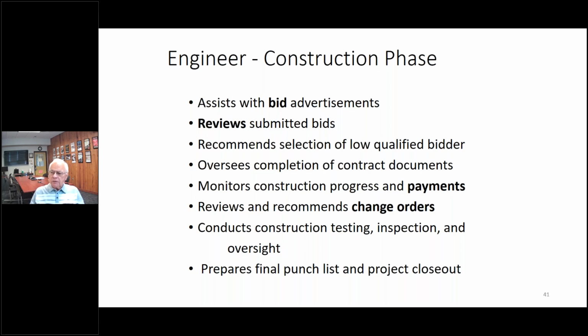Engineers are not perfect. There may be errors in the design or unforeseen conditions in the field, thus changes in the construction that warrant extra time and extra payment to the contractor. Thus, a change order is necessary.